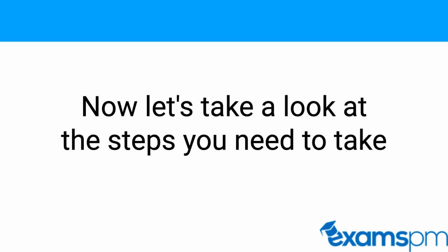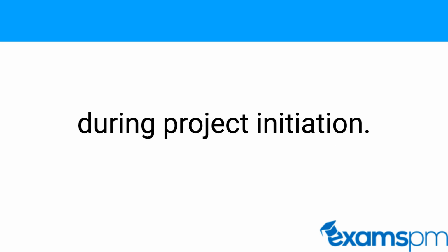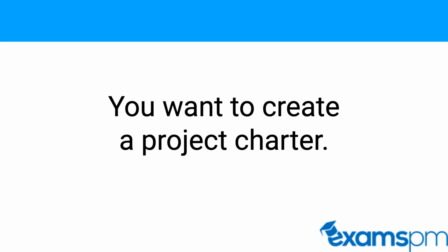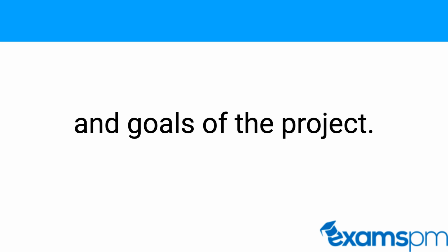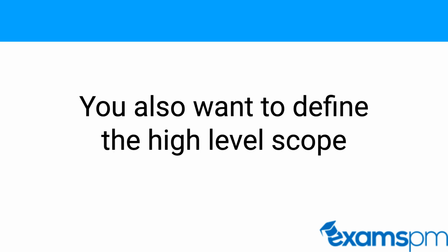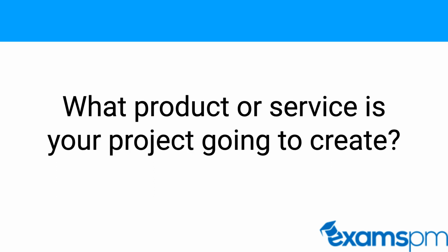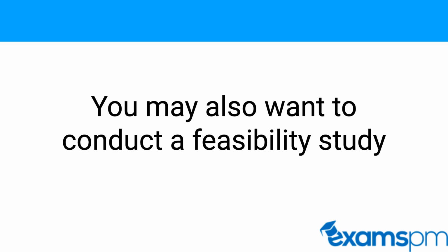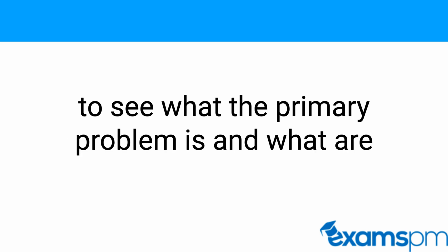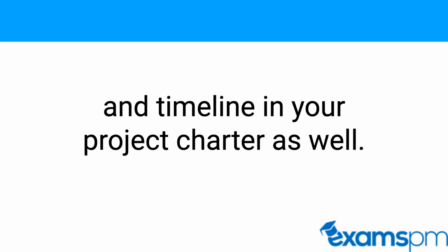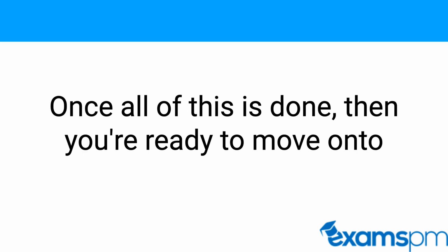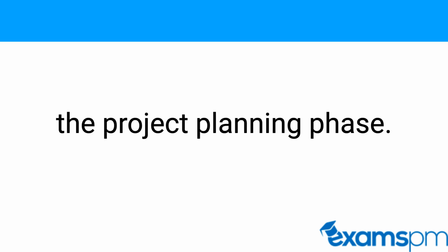Okay, now let's take a look at the steps you need to take during project initiation. You want to create a project charter. The project charter will lay out the vision, objectives, and goals of the project. You also want to define the high-level scope and deliverables. What product or service is your project going to create? You may also want to conduct a feasibility study to see what the primary problem is and what are the probable solutions. You should also include the high-level budget and timeline in your project charter as well. Once all of this is done, then you're ready to move on to the project planning phase.